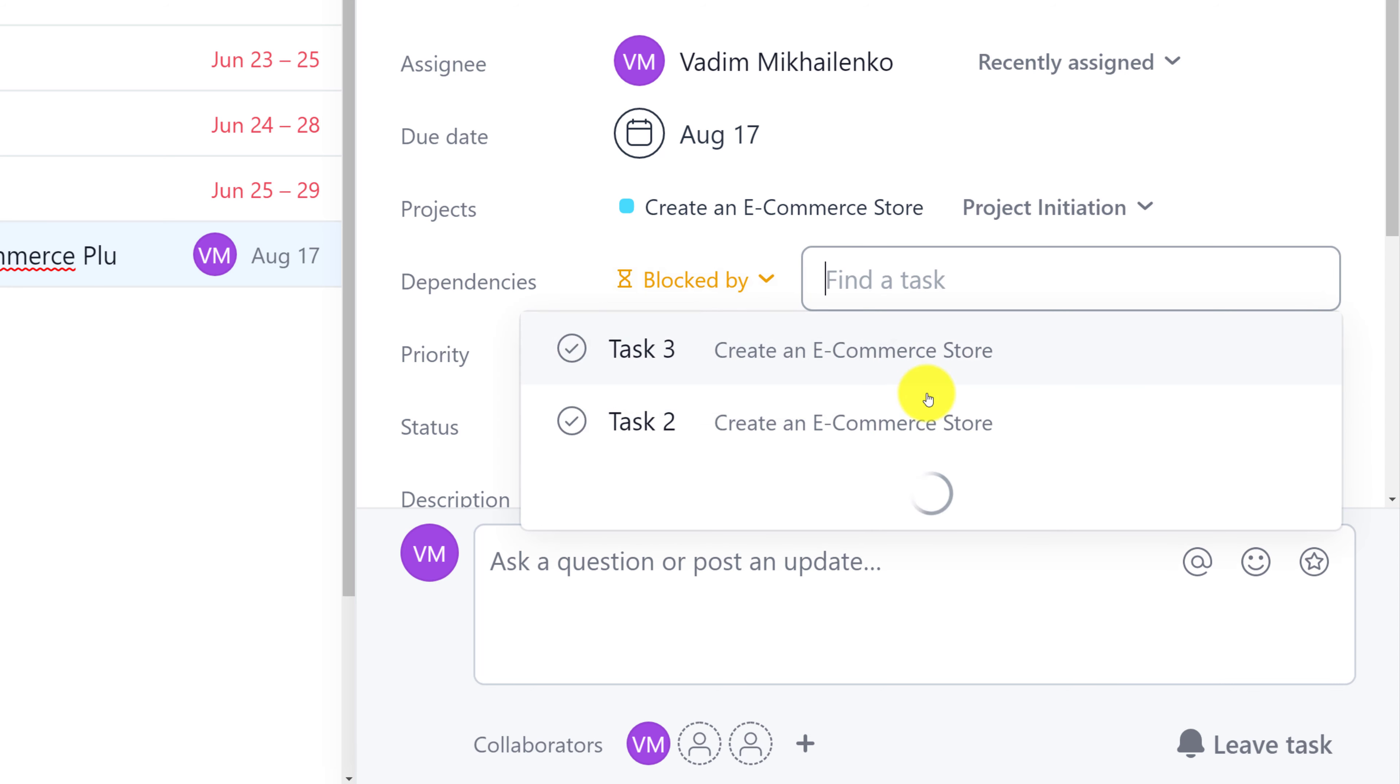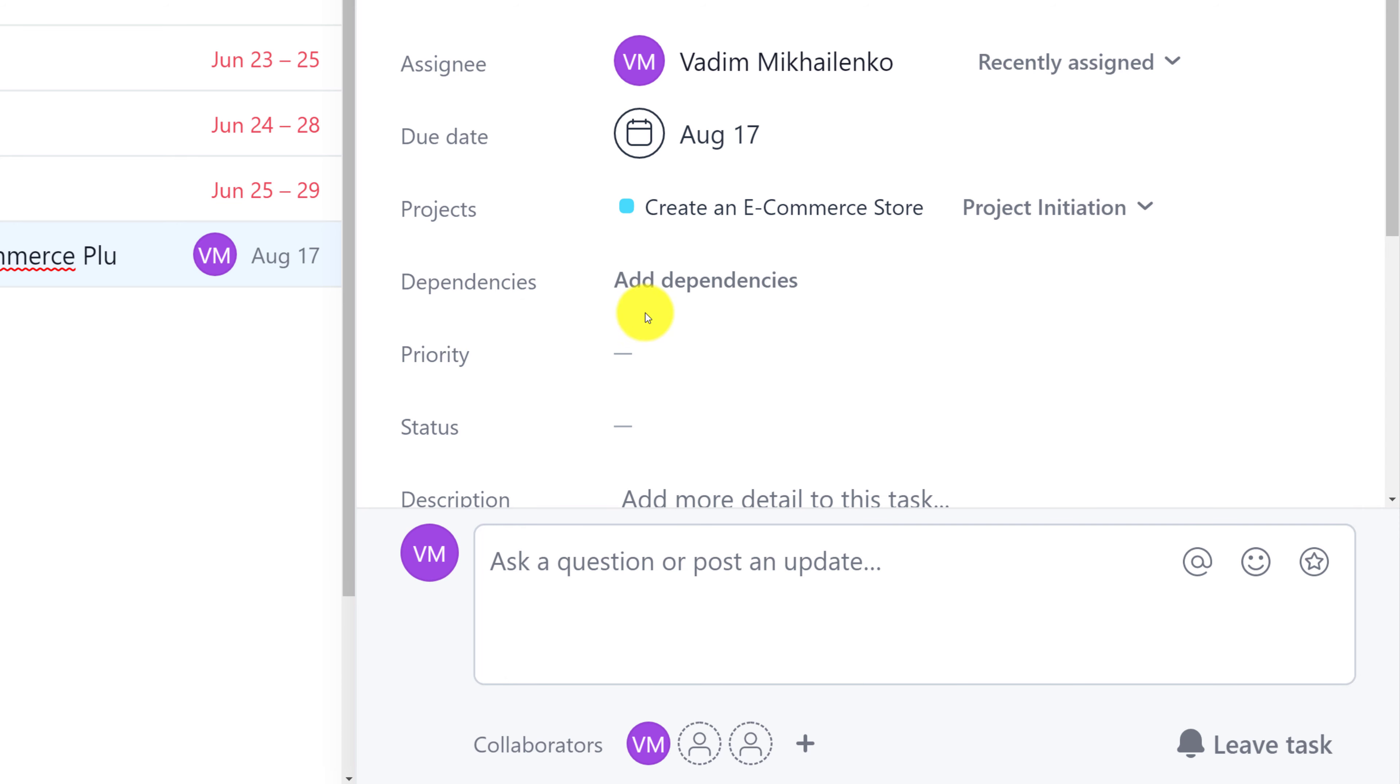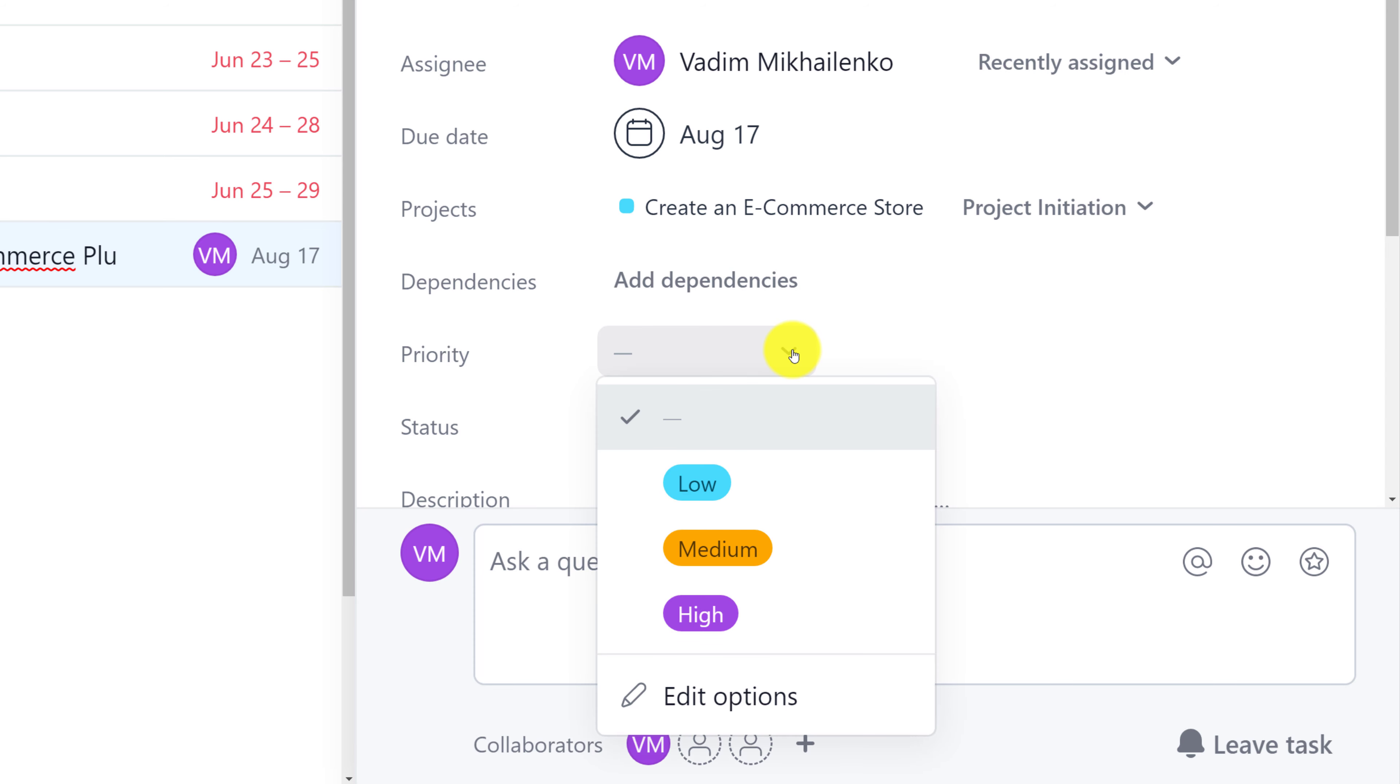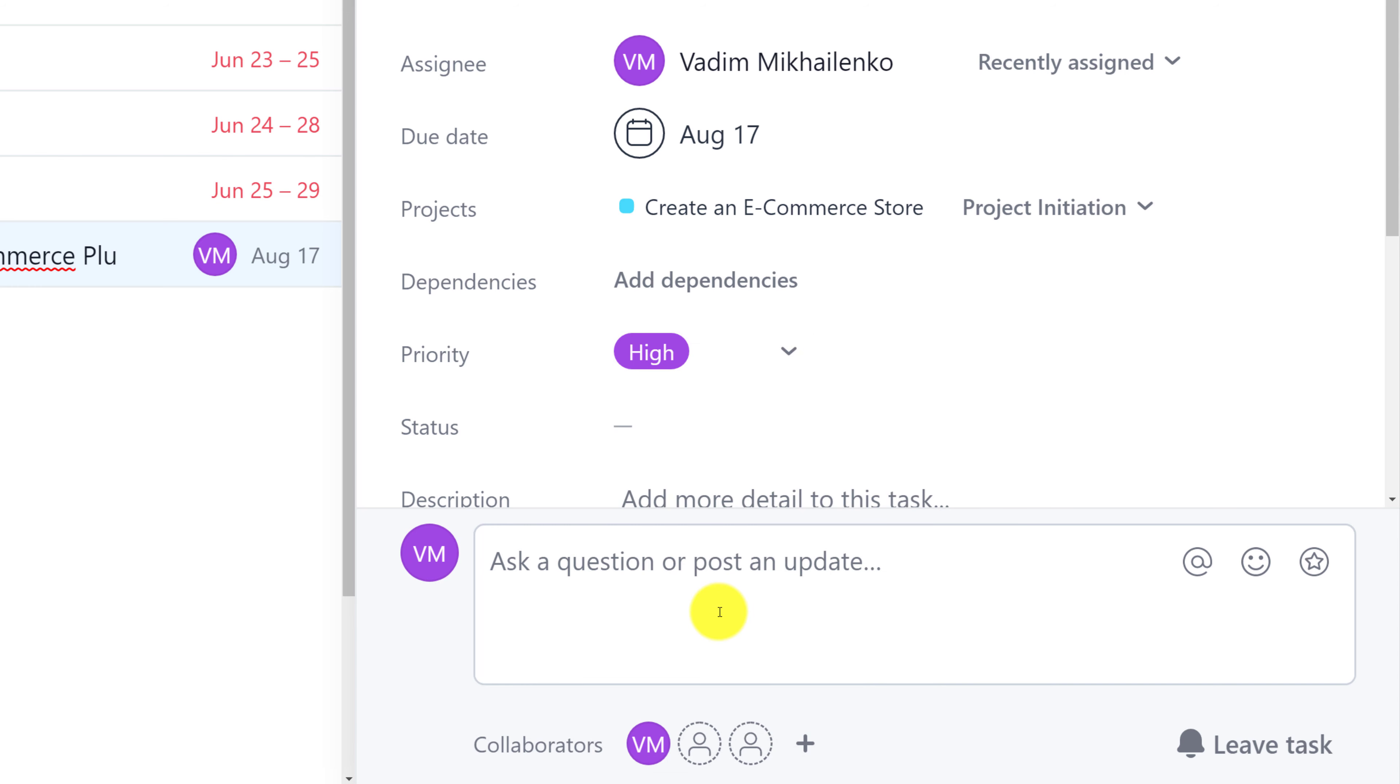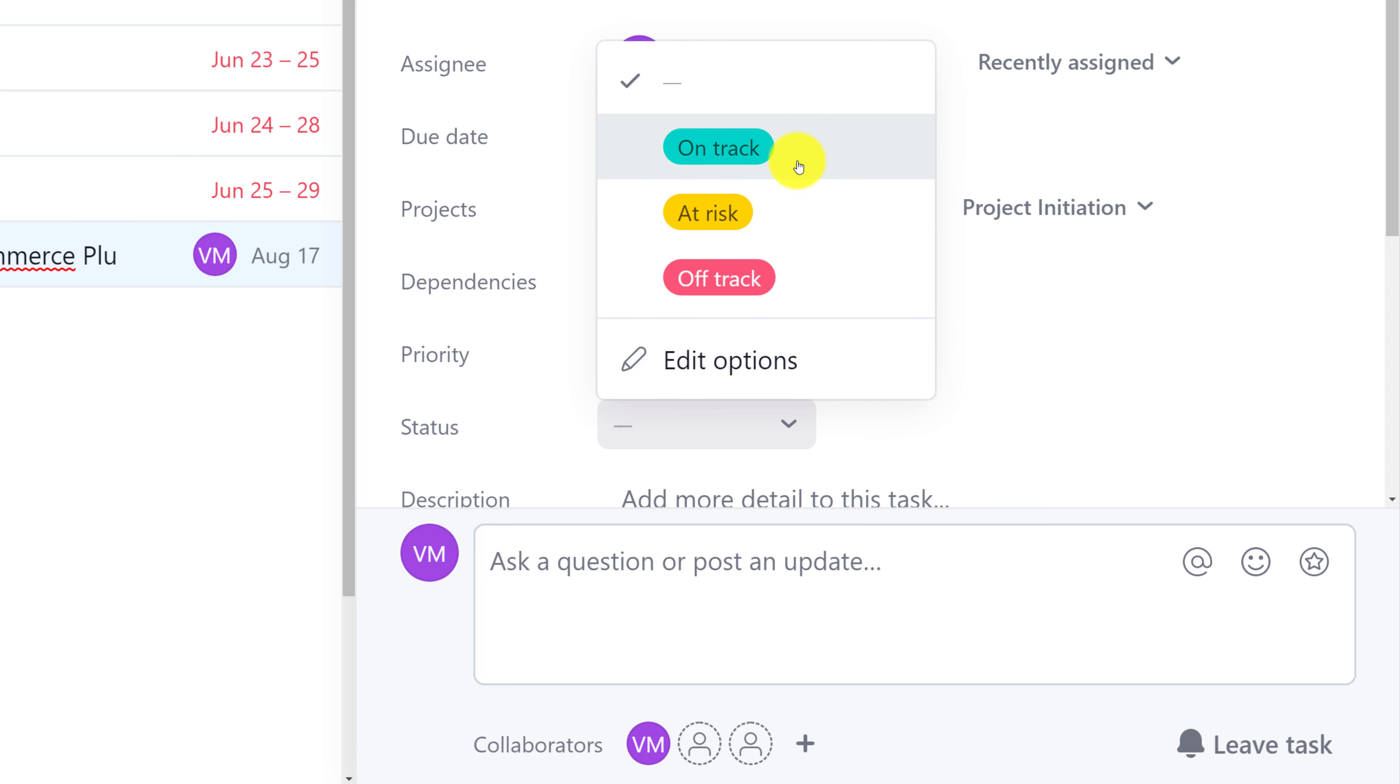In the next section, you need to add dependencies. Is this task dependent upon other tasks? And you see multiple tasks in this project as well as in other projects that I am running here in this system that you can choose from. I am not going to select anything, but in a real project, there might be dependency. In the priority field, you need to define what's the importance of this task. To me, it sounds like a high importance because we can't move forward without completing it. And in the status field, I am going to say on track. But you have two other choices, at risk or off track. And you can add your own choices by using the edit button.